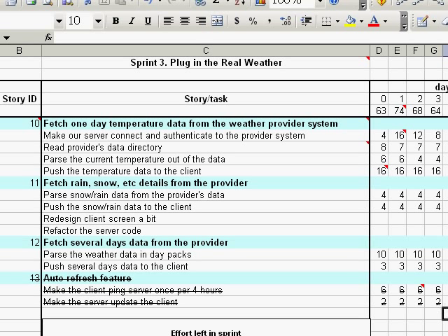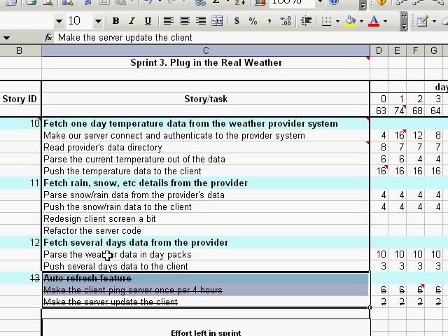What you see here is the simplest possible sprint backlog implemented in Excel. The format simplicity is both a power and a weakness. It's very easy to get started with this kind of template, but quite many things have to be done manually. For example, there is no automated copying from the product backlog to the sprint backlog, and for task removal you might have to use the font dialog and insert or remove Excel rows manually.